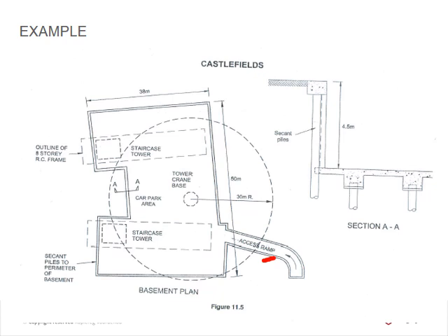And then there will be a pedestrian access via scaffolding access towers. The volume of the excavation material is approximately 9,800 square meters, and the program duration for the works is 4 weeks or 20 days. Okay, so then they can calculate, okay, I need X amount of trucks coming in. So you will see that on page 250, where they actually do the calculation of machine output. There's 25 loads per day that they have to take out.